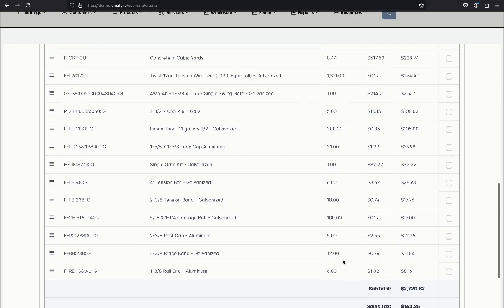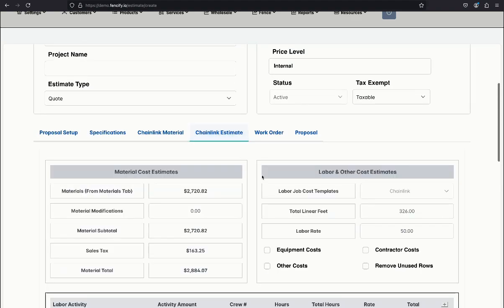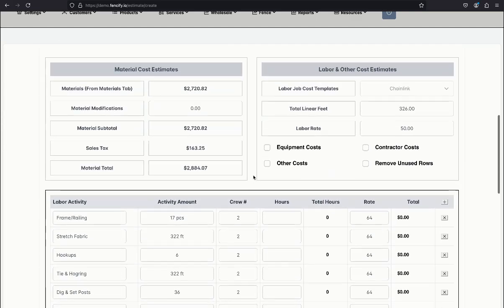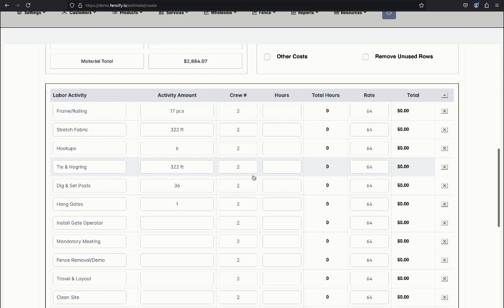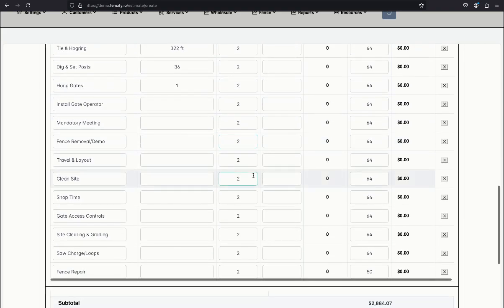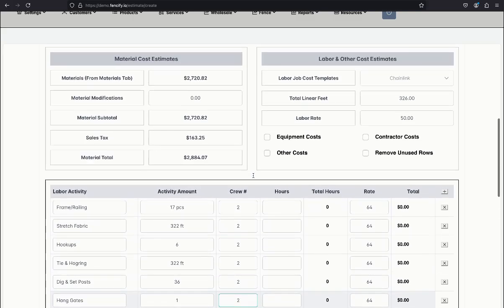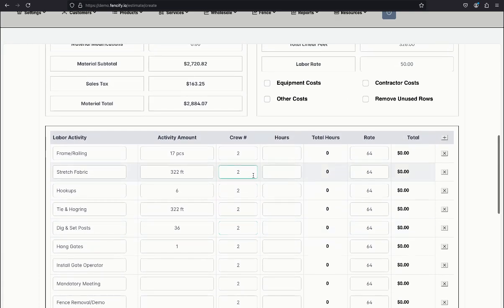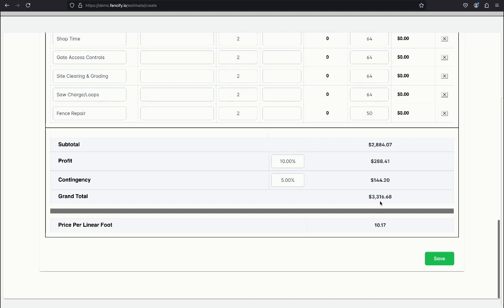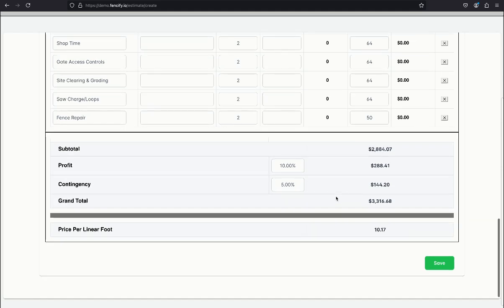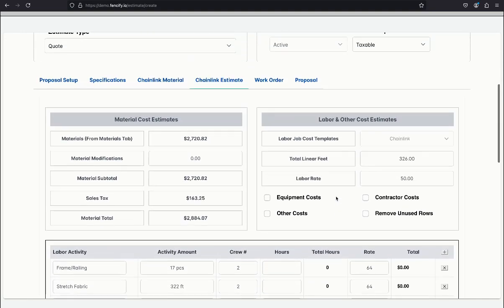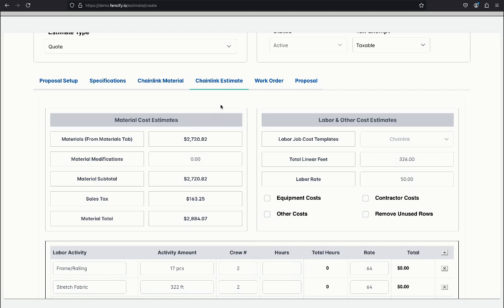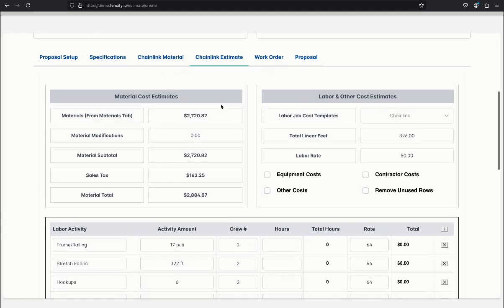The system also generates a second tab, which is a list of all the job costs that potentially are associated with that job. So let's take a look at the job cost tab, which provides the final catch-all for each estimator, and when completed reflects all the anticipated cost and profit, as well as that section's proposed install price. But please note, as mentioned earlier, there could be multiple estimators associated with one proposal. Those estimators, each one will be combined ultimately to generate the completed proposal.